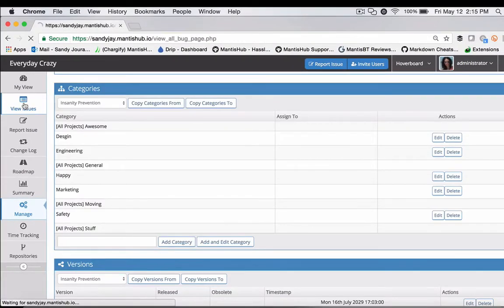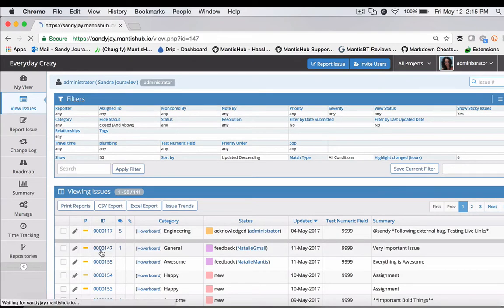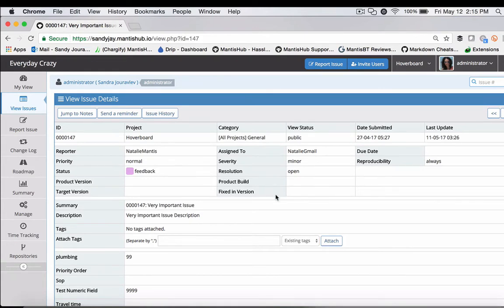Until you actually create your versions, your issues will not show any version-related fields. Product version, target version, fixed in version, etc., will not be displayed until those versions are created.